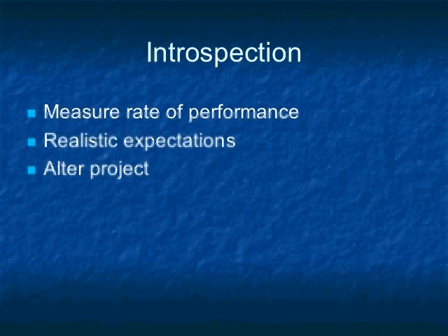Even though only 3 of the activities had been completed, it was easy to see that the project was already off schedule. This is useful information for project managers because it allows them to see their rate of performance and know what to expect of the project's progress. Furthermore, it may demonstrate the need to alter the project in order to finish on time or reduce overspending.